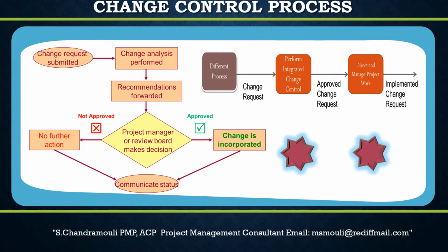Change control system is a collection of formal, documented procedures that defines how project performance will be monitored and evaluated. It includes the A. paperwork, B. tracking systems, C. processes, and D. approval levels needed for authorizing change. In many cases, the change control system of the performing organization can be adopted as is for use by the project.